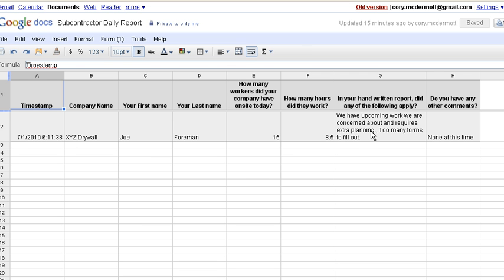One of the issues with this approach is that not all of our subcontractor foremen have access to the internet and computers. What I'm proposing here is that we put a $300 netbook in a safety trailer or in a conference room somewhere, so that the foreman can go in there at the end of each day and take a few minutes to fill out a couple of the forms that we're developing. That $300 investment is going to have massive payback over the lifetime of a project and across all of our projects, gathering some truly meaningful data that we can analyze to improve our process.